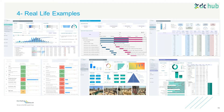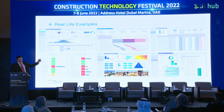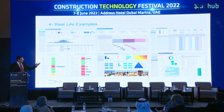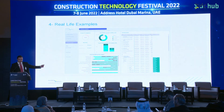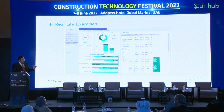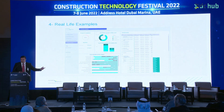Looking at a real-life example from one of our projects, where more than half the project uses this model, you can see the process, critical paths, and cost on the dashboard. As we upload the schedule or any data, we can review quality using DCMA-14 standards and more. We utilize our risk model, health and safety statistics, and quality statistics, plus our predictive analysis, which shows risk in color - the darker it gets, the more risky it is - tracking what happens in schedules from update to update. In this specific case, I can see that testing and commissioning is in a darker color, so I need to pay attention to it.